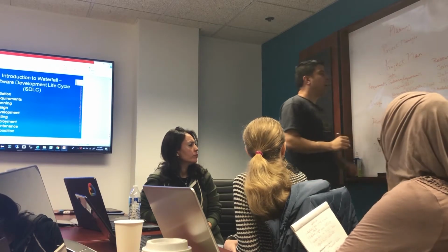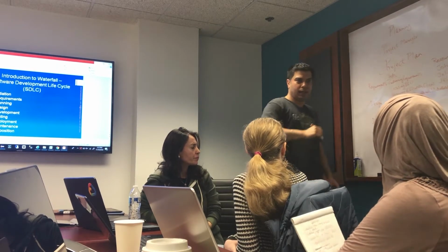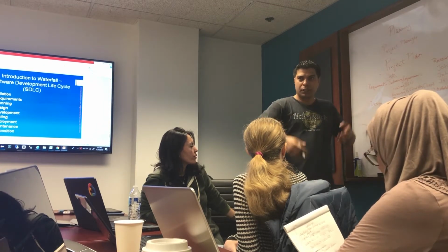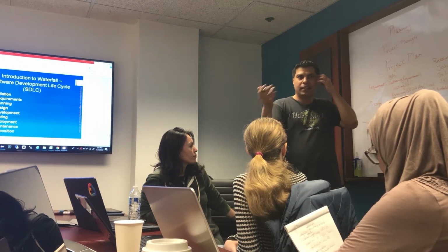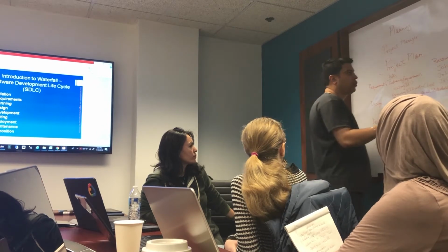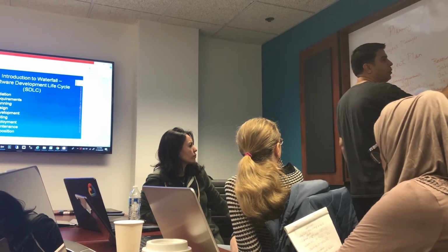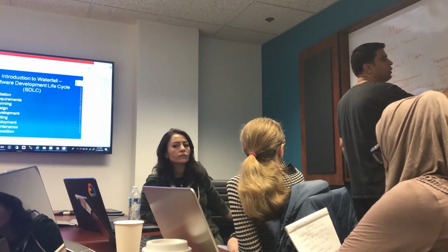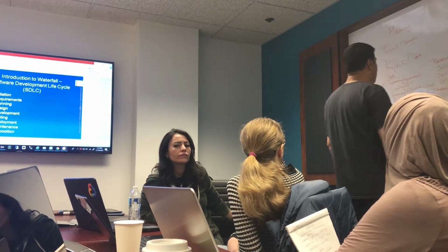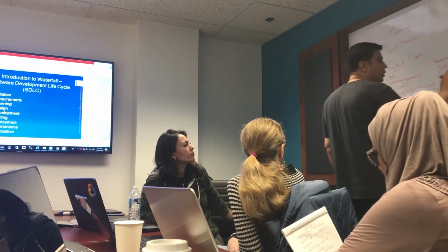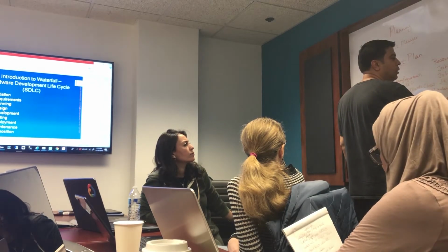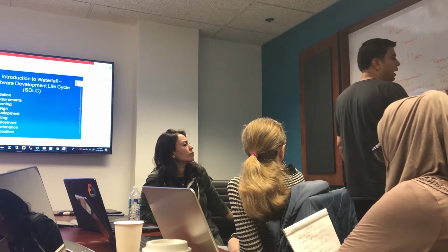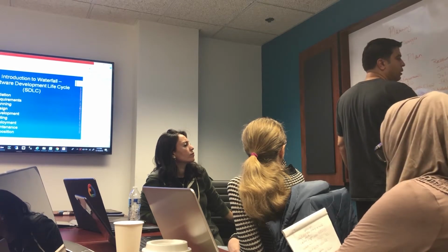Okay, how many days do you think? That's your best estimate. Based on these managers' experience, they give the best estimate. Okay, so let's say gathering requirements was 3 weeks. Creating BRD was 1 week. Reviewing BRD with the client, 2 days.